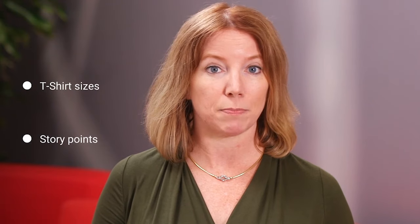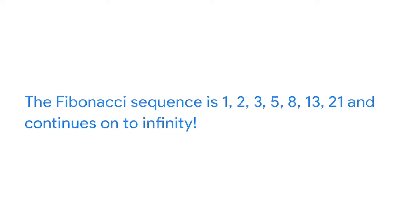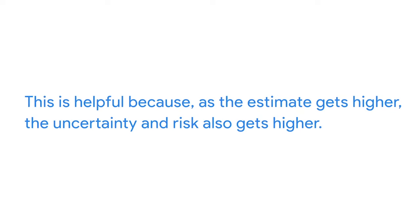My favorite estimation method is story points. Story points are a bit more advanced than t-shirt sizes but the concept is similar — the team picks an anchor item and conducts estimations relative to it. Instead of t-shirt sizes, this process uses a famous mathematical sequence called the Fibonacci sequence: 1, 2, 3, 5, 8, 13, 21, and continuing to infinity. These numbers start close together but spread farther apart as they get higher. This is helpful because as the estimate gets higher, the uncertainty and risk also get higher. The number combines both effort and risk — there's not much use debating between 21 and 25 points, but choosing between 21 and 34 is a real conversation.